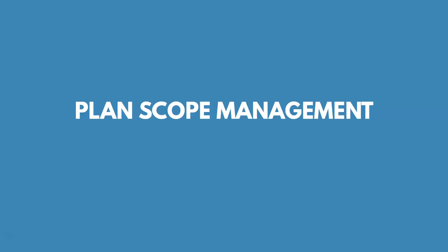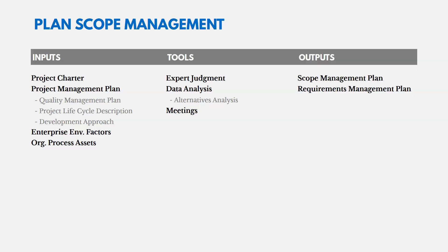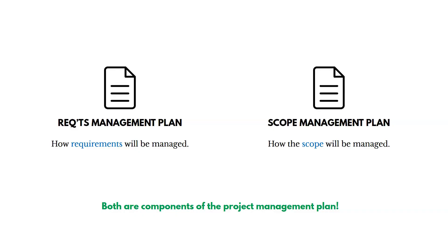Let's look at the first process, Plan Scope Management — documenting how scope will be defined, controlled, and how we'll collect requirements. Focusing on the outputs: the scope management plan and the requirements management plan. The requirements management plan documents how requirements will be managed and collected from customers. The scope management plan describes how scope will be managed, what techniques and methods we'll use. Both of these are components of the project management plan.